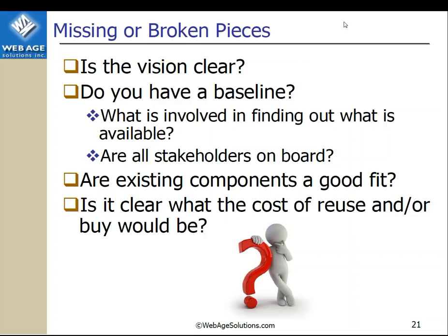And then when you do find components that relate, are they actually a good fit? And do you have the resources? Certainly, we're not expected to be experts on everything. Do we have access to those that do have that level of expertise to help us determine the appropriateness of reuse? And then, of course, what would be the cost? It's a bit of a misnomer to think that if I reuse something that's existing, then it's free. There's an impact when you're adding more use onto something. So an existing component has a current use, and now we want it to carry the load of something else. So what's the cost? Even if it doesn't itself have to change, maybe the support under it has to change. And then, of course, how are we actually getting everybody that's related to that component to understand this new use of it?